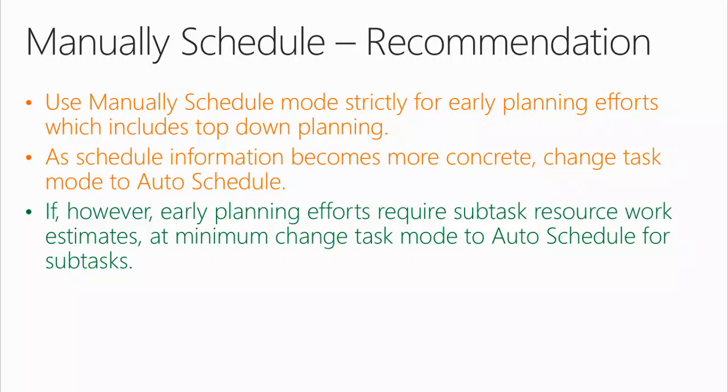Okay, so when you walk out of here today, our advice to you, my personal advice to you, is the minute you assign a resource to a task, get out of manually scheduled mode.